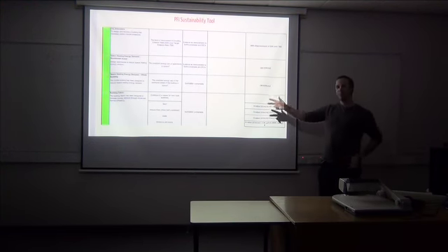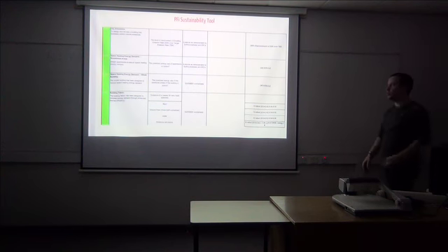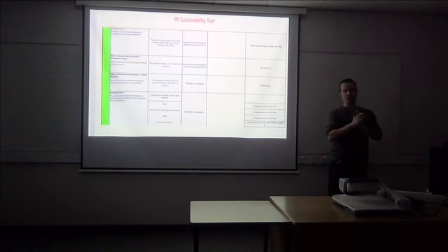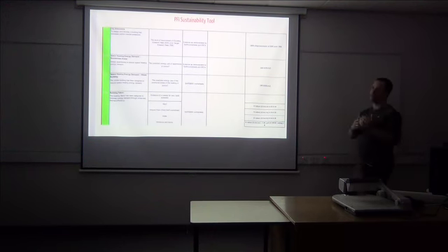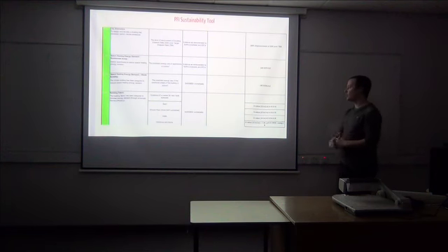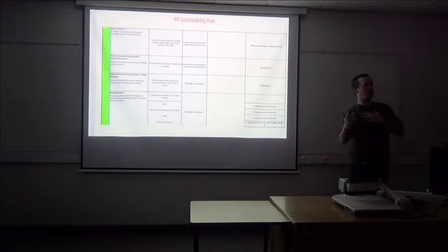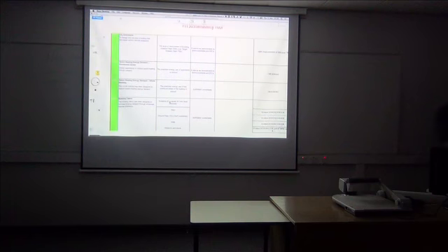Building fabric. We know that building fabric in construction, so the walls, the windows, the doors, the ceilings, the better quality they are in terms of reducing energy transmission across them, the more energy efficient a building will be, the less expensive it will be to heat, and the more carbon we will save. And that's measured directly in something called a U value. Again, we could set those targets and say if your U value is this, you score 1 point, this, 2 points. So we can measure directly some of these aspects in this tool.